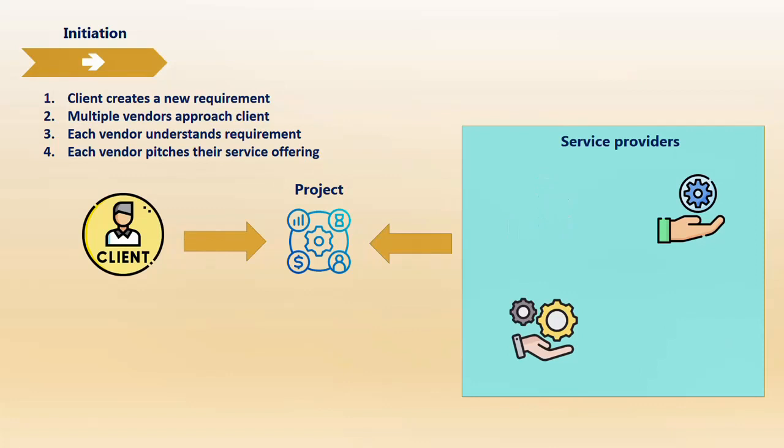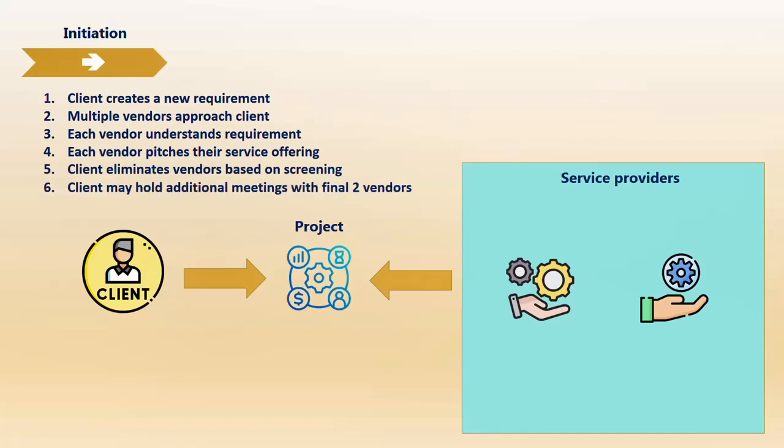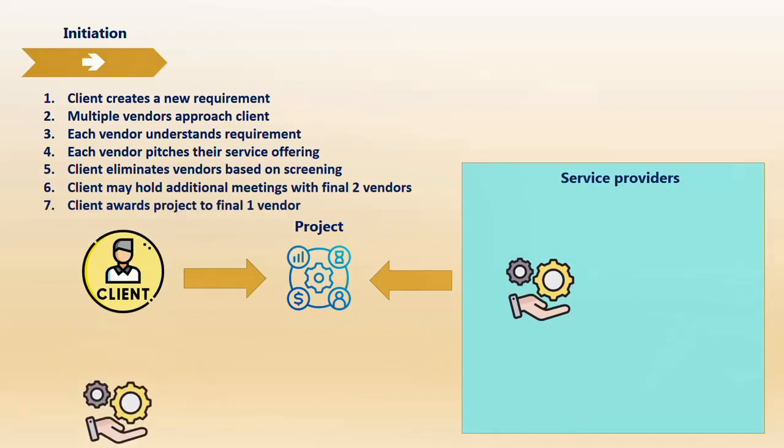The client, after talking to each service provider separately, will start eliminating some that weren't up to the mark. There can be many reasons: their monetary offering was over budget, their capabilities weren't up to expectations, or not on par with client requirements. The client eliminates vendors one by one, narrowing down to the last couple of vendors. The client may hold additional meetings for clarification. It's not guaranteed you'll win the bid in one meeting. The client finally awards the project to the final vendor.